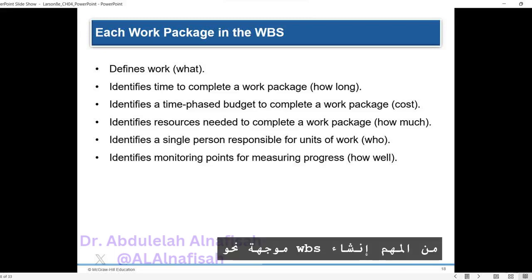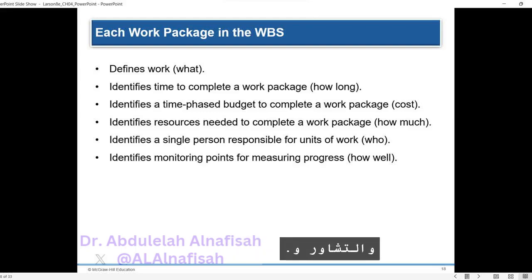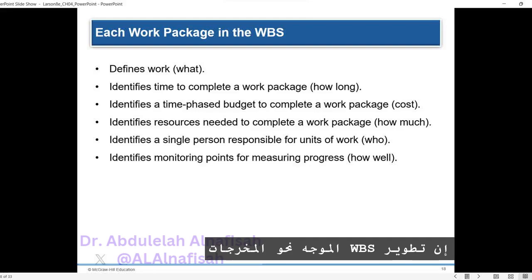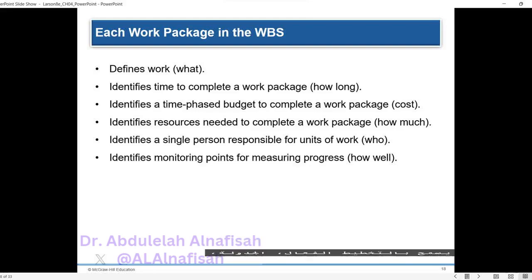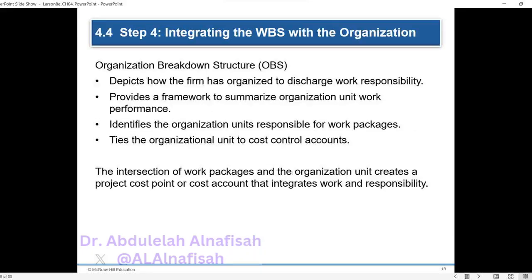It is important to create an output-oriented WBS that focuses on concrete deliverables rather than organizational functions or processes. Project managers can benefit from using relevant examples from previous projects when creating a WBS. Stakeholder consultation and revision are crucial for agreement and alignment with the project's objectives. Developing an output-oriented WBS allows for effective planning, scheduling, and control of the project.